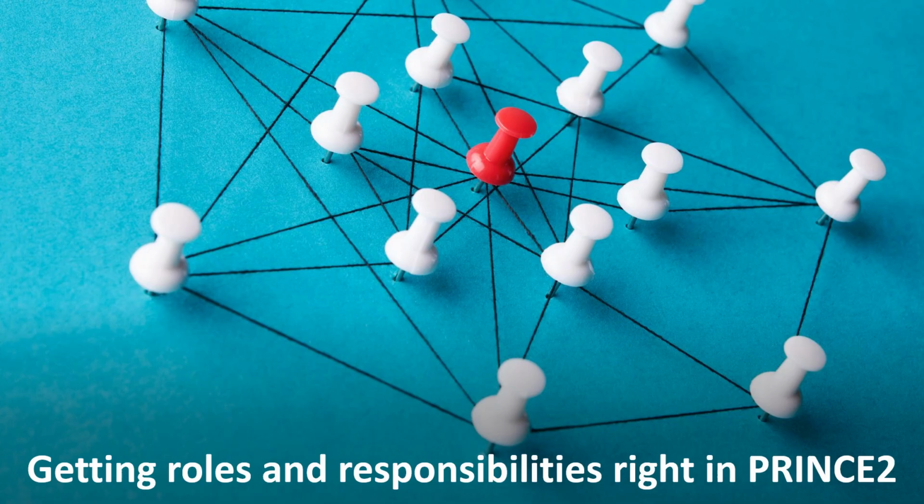Okay. But that last bit, to ensure all responsibilities are fulfilled, that feels like the critical part, doesn't it? Exactly. Because we've all seen org charts. How does this go beyond just drawing boxes? What's the real strategic benefit here? Well, a typical org chart shows hierarchy, right? Who reports to whom? This PRINCE2 requirement demands total coverage. It forces you to look at every single responsibility needed for the project, things like project assurance, maybe day-to-day risk logging, whatever it is, and explicitly map it to a specific role or even a named person.